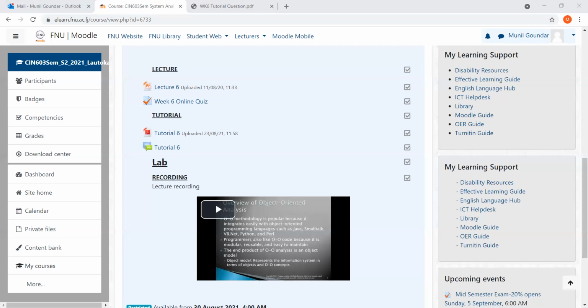Now choose designer. Choosing a designer has a predecessor of 2 and 3. This is 2, this is 3. Surprisingly, both of the dates that those activities finish is the same. Therefore, 10 Jan 22. It takes how many days? 2 days. So 10 plus 2 gives you a value of 12. 12 minus 1 gives you 11. So therefore, 11 Jan 22.